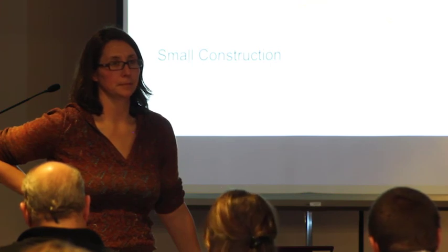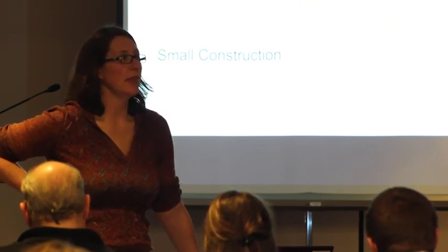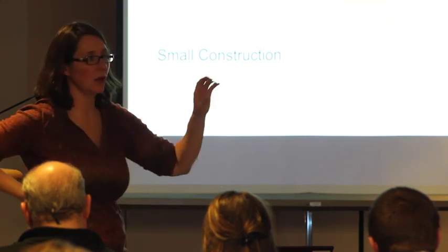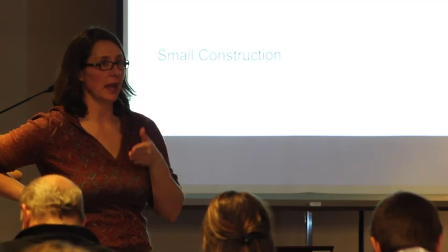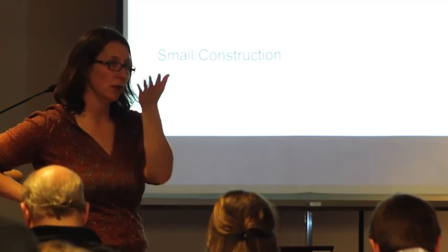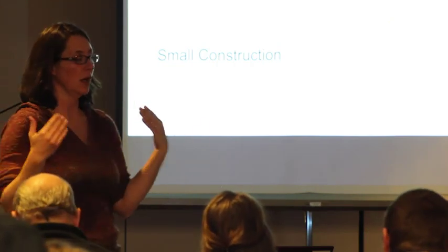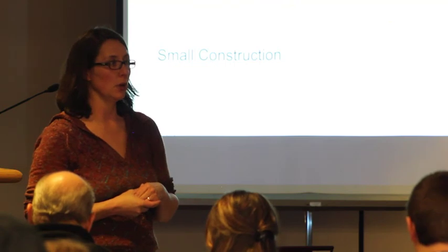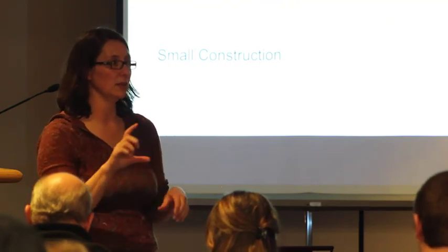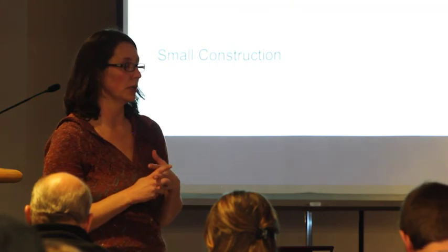So they just submitted an alternative inspection plan with their SWPPP application. And that's something you can fill in, in that section where it gives an inspection schedule. Outline that in your inspection schedule. If you know, like she said, that you cannot access that site between October and May of the year due to road and weather conditions, then outline that and submit that as part of your SWPPP as an alternative inspection schedule. Yeah.